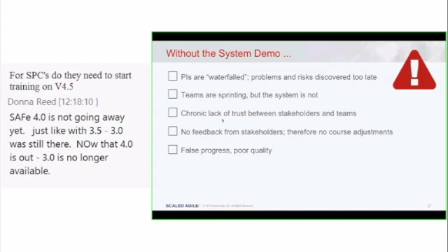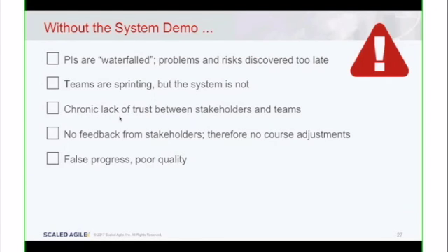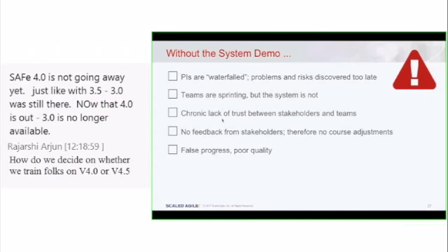And the other thing that does is it uncovers all kinds of DevOps issues, right? So for instance, they discover that our staging environment really isn't set up. The libraries, the hardware really aren't set up. And they also discover how difficult it can be to deploy their solution to a staging environment, and how time consuming it is. And so that gives them insight into maybe all of the work they didn't know they had to do, right? They discovered that work much earlier.